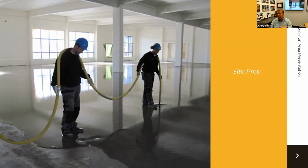This is when you start to look at all of these factors. You look at the project schedule. Some buildings have very terrible slabs. Some have decent slabs. And so we do surveys. We do elevation surveys and heat maps to understand where the problems are going to be, overlay it with the floor plan. So all these things are extra work. I mean, it is why we do what we do. But we have to relay all this to the clients. They have to understand. And we go through teams like Maureen, when you have an owner's rep involved, who can explain to a tenant who doesn't do this every day what their options are. Those are some of the biggest challenges we have.